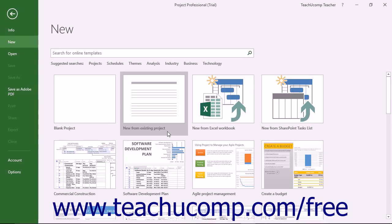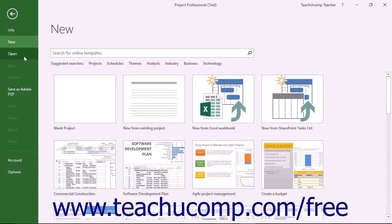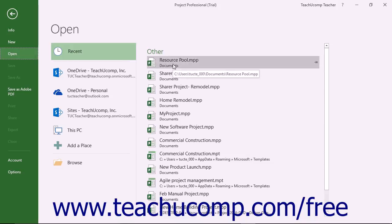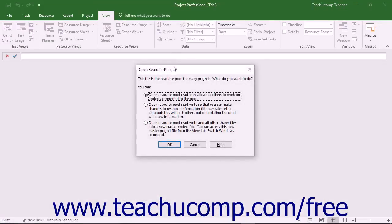To make changes to resource details when using linked projects, open the linked resource pool project file as read-write and then make changes. When you open a linked resource pool, a dialog box appears that asks if you want to open the file as a read-only copy or as a read-write copy. When changing resource details, like the units available for a resource, you need to open the file as read-write.